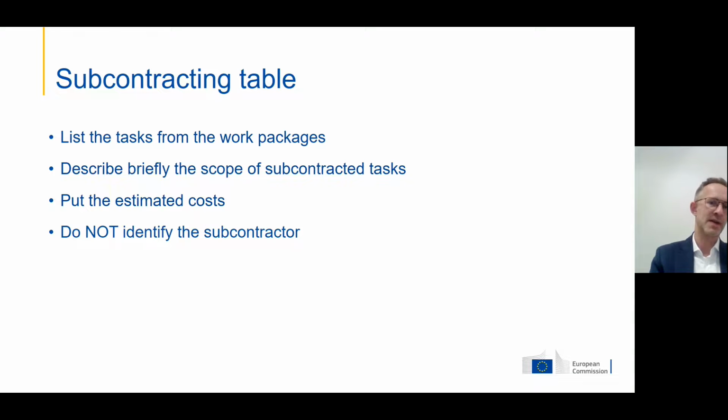We have some procedures for how we can amend the grant agreements, and then you will be able to add them or adjust at a later stage. And please, kindly, do not identify any subcontractors by name. This is not possible due to some procurement issues, and should not be done in this table. Otherwise, we'll be asking you to remove this information later.